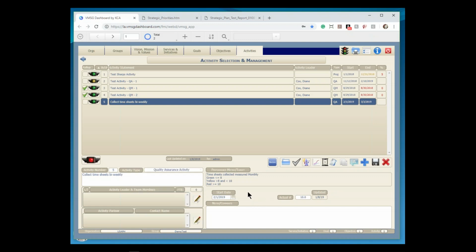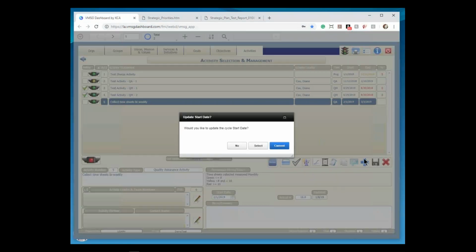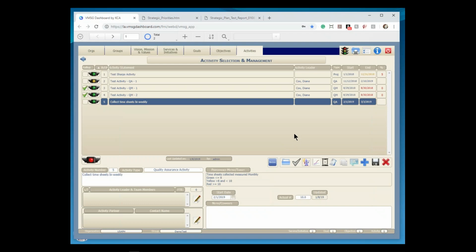So when I save that, it's going to say if the spending is less than 8, it's going to be green, meaning you're doing really well. If you're spending between 8 and 10,000, it's going to be yellow. And if I'm spending 10 or over, it's going to turn it to red, which is what it did here. So when I save that, to current date, now we have that because we spent over 10. So yeah, if you do that for your spending, it's going to automatically set the traffic light based on those values you put in there.